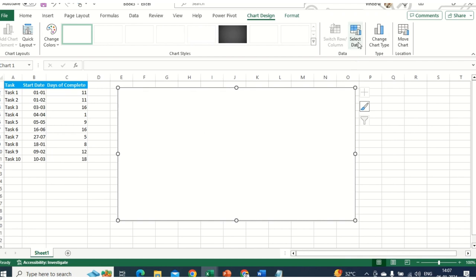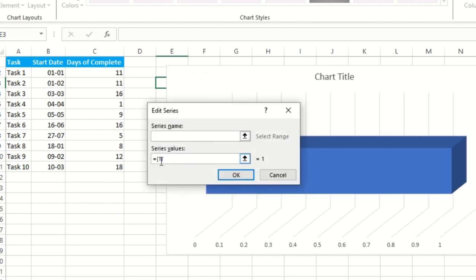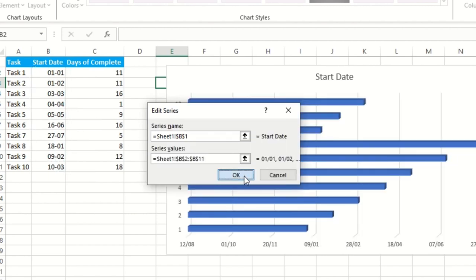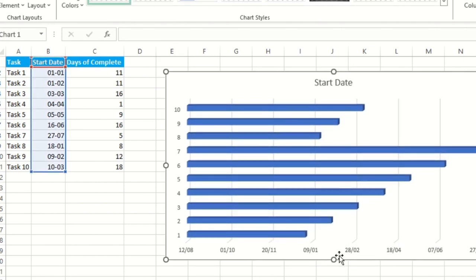We need to click on ADD to add a data series. We are not directly selecting the chart data range here — just click ADD. As soon as you hit ADD, directly select the Start Date column. In the series values field, press Backspace first, then select the entire date range. Hit OK. You can see the dates have been plotted automatically in the chart.